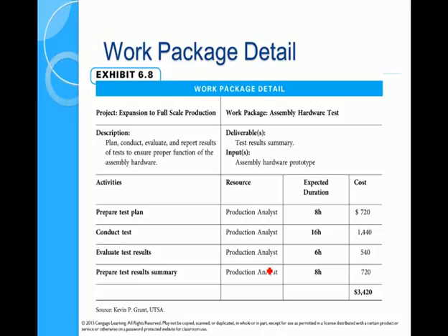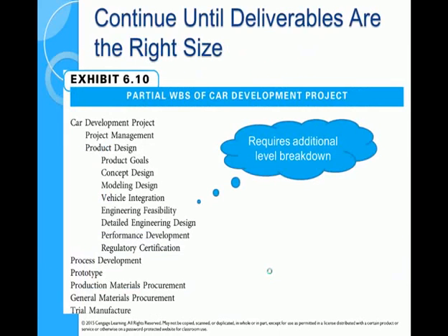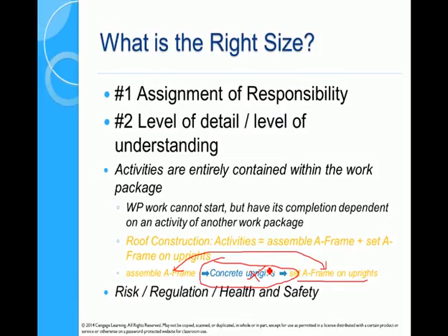How does this contribute to the rest of the project? So the main thing about deciding what is a work package is, is there one line of responsibility? Is there sufficient detail for the work to be understood by that person responsible or the people undertaking the activities? And have we got a discrete work package that won't be interrupted by other things?